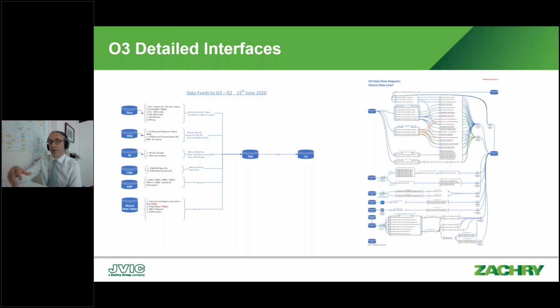That enables the planners to see through the dashboards the status of their IWPs in their discipline or their area, and manage those constraints through to resolution, picking up the phone, talking to engineering, weekly meetings, however they manage those, using the O3 tools, tasks to put actions on people and close out these constraints. And they can have threaded conversations and track the audit history of each of those constraints to make sure that they've got the thread of who's holding the ball and nothing gets lost.